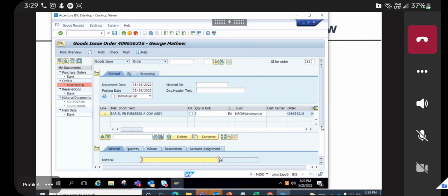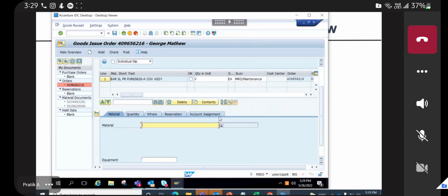These are actually important, and this is a very frequent scenario, right? Because my planning cannot be 100% correct every time. So these are called unplanned materials. Rather than adding it on the order, we can directly issue it here, so that the person will know what was planned and what was not planned, and what the accuracy of my planning is. Basically, we can directly post an unplanned material from the work order, which goes as an unplanned issue.